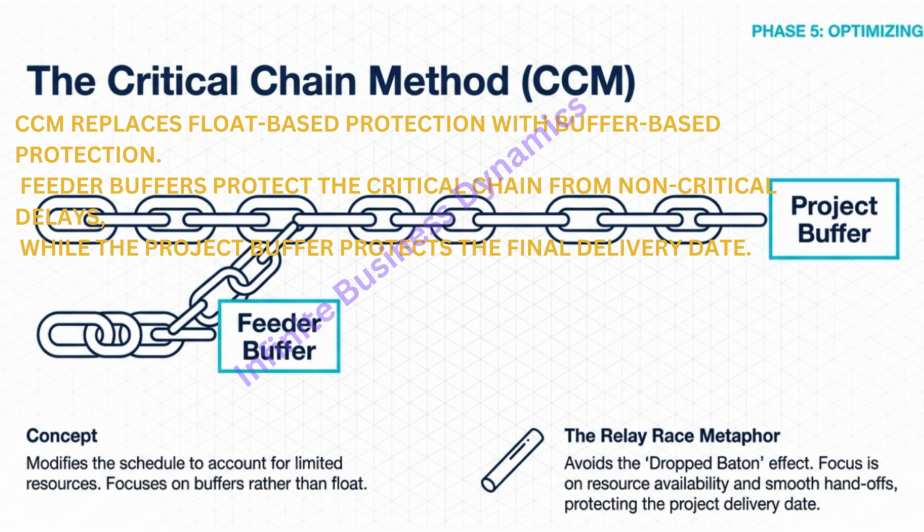In a normal project, if I finish early, I rarely tell you. I just sit there until the due date because of student syndrome. In critical chain, the culture is, I am done, here's the baton, go. It minimizes the downtime between the tasks.